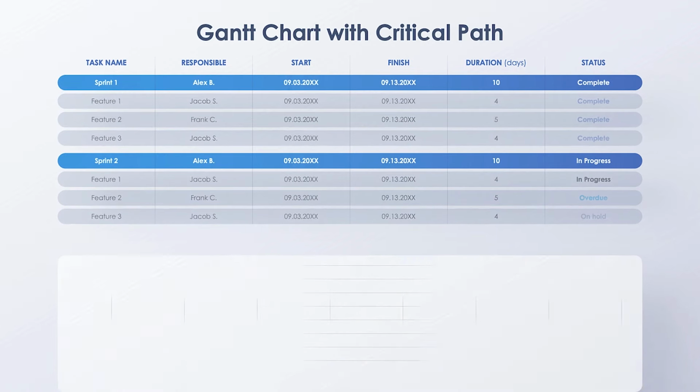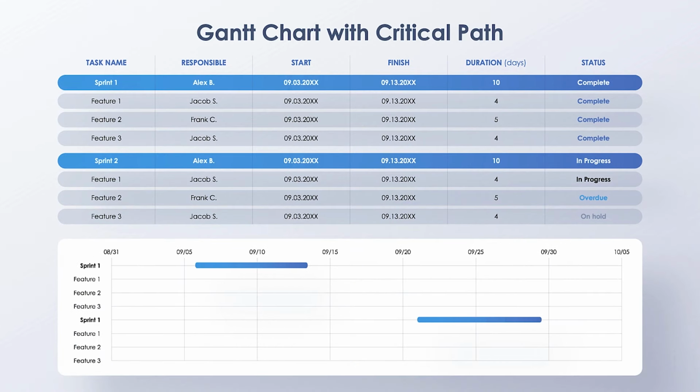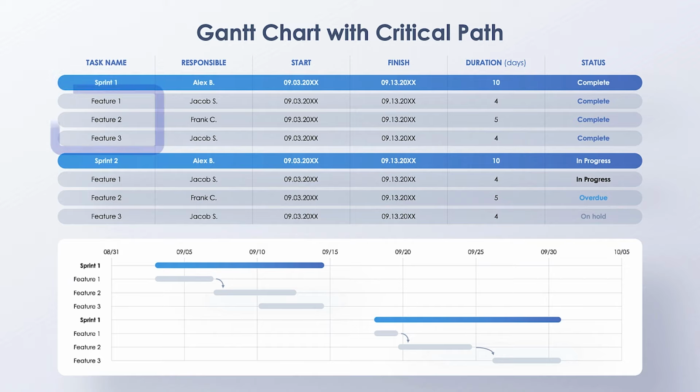But in order to stay on track, they also had to get around another critical issue. The dam required so much concrete that if they poured it all into one block, it would take over 125 years to cool. This was the critical path needed to overcome to finish the project on time. They would have to break up this large task across multiple smaller tasks in order to reach their target end date. So what was their solution?